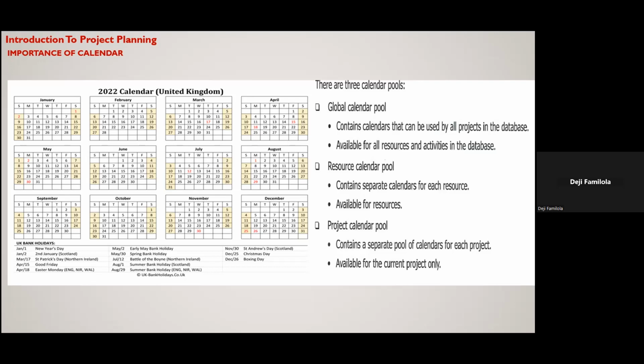So you could have a holiday calendar, and probably you would be made aware of these a month before they go on holiday, because some people will just book holiday. Most companies will say book your holiday 4 weeks or 2 weeks before you're going. They must notify us so that we can sign it off. You cannot just book your holiday for tomorrow when you're today. So when they sign it off 2 weeks before you go on holiday, they will inform the planner that this guy will be on holiday.